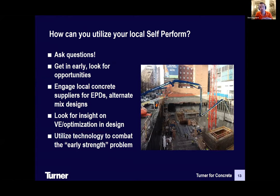If you have SPO in your business unit, how can you leverage them to help? Both your local SPO group and your local sustainability manager are excellent resources — use them, ask questions, engage them early. Make sure you bring them in early in the process to look for opportunities and set goals early on. When you get to CD level documents it's kind of hard to go back and change design parameters, whereas if you're talking about these things early — in SD, concept, or DD — you have more opportunities to make changes that will have a real benefit. Also engage your local suppliers for EPDs, lunch and learns, and alternate mix designs. They're the experts.